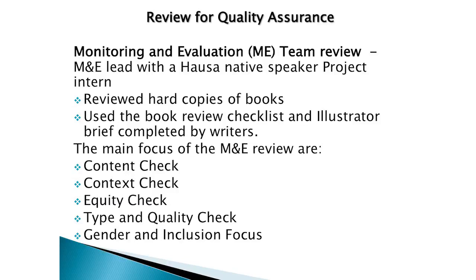Now they worked with hard copies. So at the end of the workshop, we printed the books that were written, and then the M&E lead worked with the Hausa native speaker to review the books, and basically they worked on the forms given to us as part of the contract to be filled by the writers. We had checklists to review in terms of content, context, equity, gender and inclusion focuses. Some of those elements were included in our contract, and those were the things that the M&E team focused on in the first stage of quality assurance review.